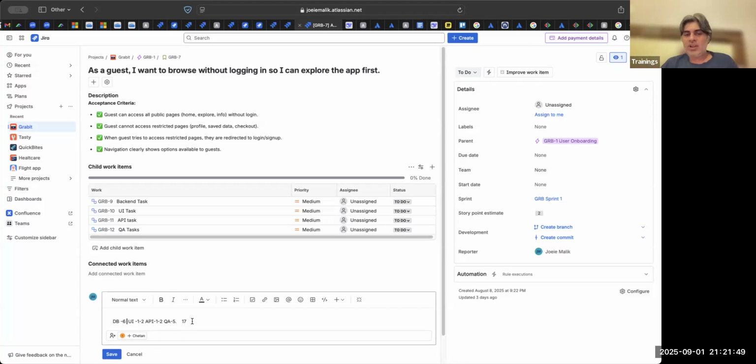So if it is, let us say it was 16, I could have still taken 3 points. Let us say it is 23 hours. Now 23 hours is 4 points. So neither 3 nor 5. Then whatever the team decides. So you can go to 5 or 3, depending on whatever the team decides on.